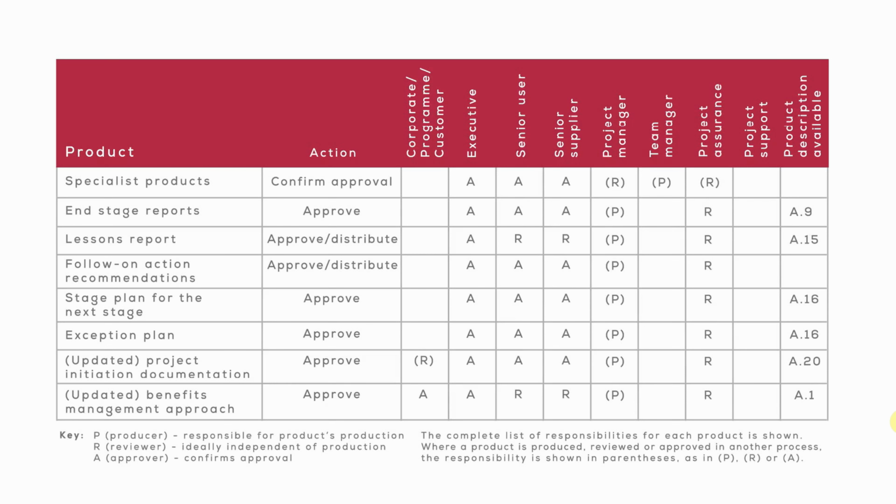So we've got specialist products confirming the approval. That's the board confirming. Those will be products that were created in the previous stage that will form part actually of the end stage report, which is also approved by the project board here. The lessons reports will be reviewed by the senior user and the senior supplier, approved by the executive.